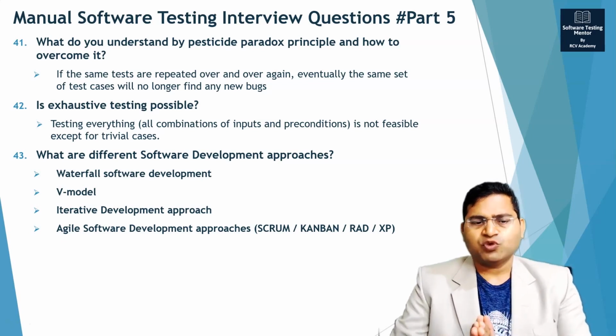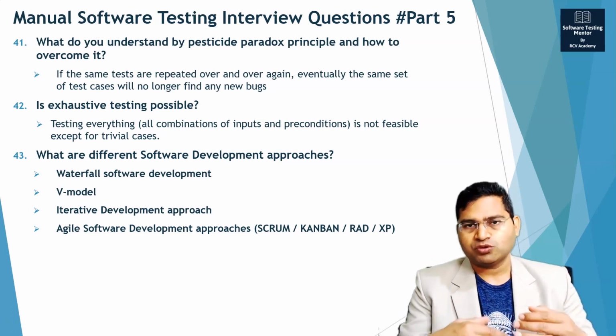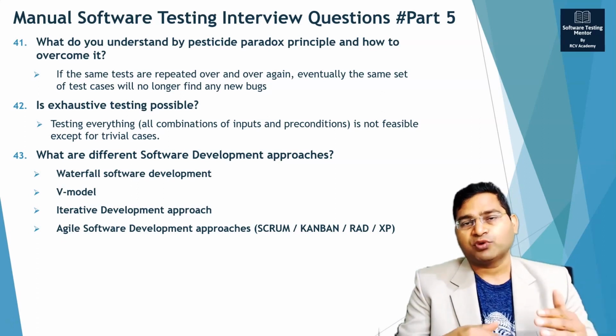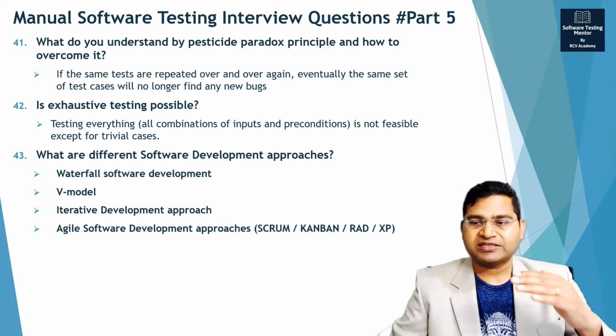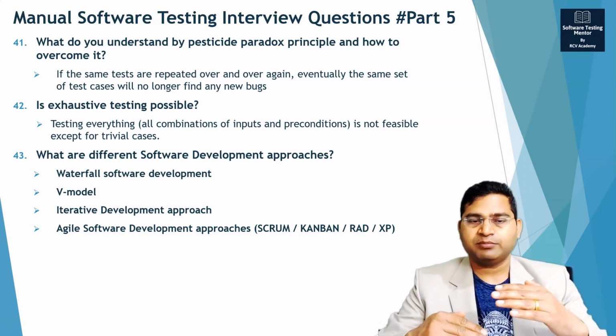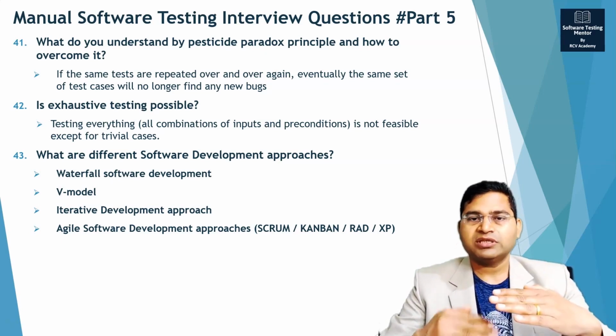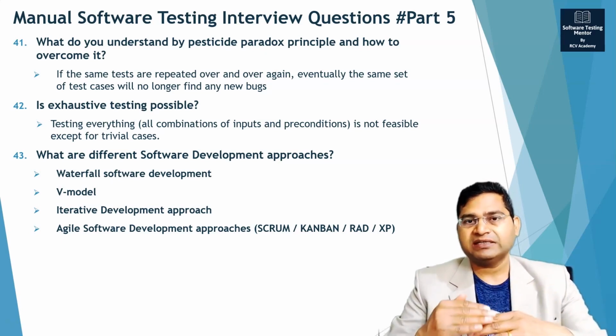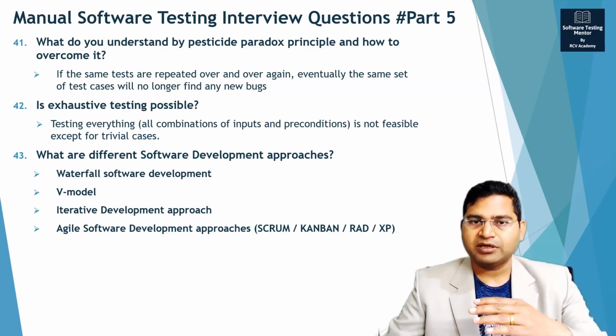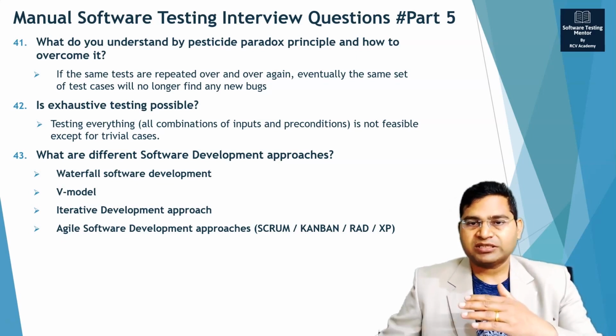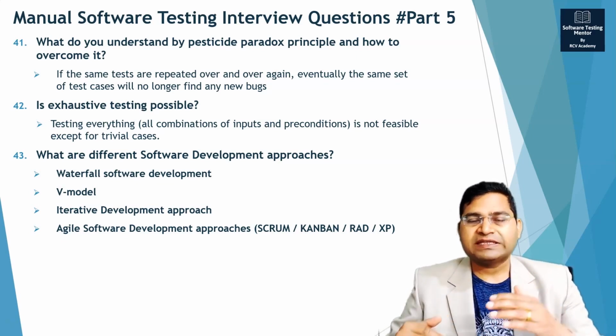Now, on the same question, you can elaborate a little more. Waterfall software development, as the name suggests, was more of a phased approach, right? Step by step. One step got completed, then the second step. When requirements are frozen, then design will happen. When design is done, then development will happen. When development is done, then testing will start. So it was a very phased approach.